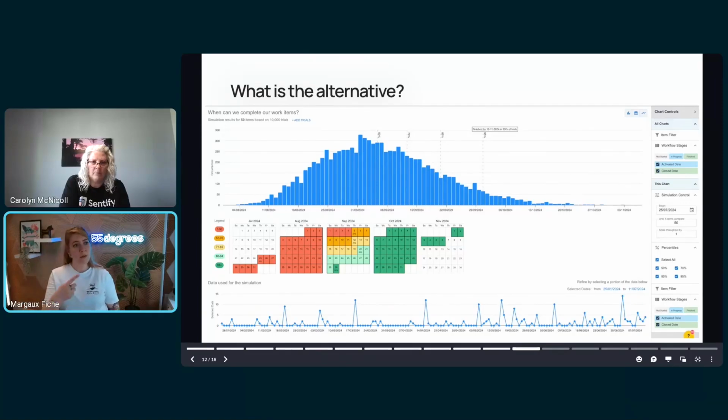And looking at how you've completed work in the past, you can apply filters to exclude what's not necessary and so forth. But let's assume everything's good. You can then get a forecast with different probabilities. And then it's all about, okay, based on the data we have now, here's the forecast. And then you have different probabilities and confidence levels. And that's for you to decide how certain you have to be with your forecast to give it to your manager, stakeholders, or whoever is asking, really.